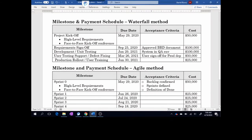In the Waterfall section, we're going to have a project kickoff phase where high-level requirements will be discussed. We're also going to have a face-to-face kickoff conference. Resources from Tech Company Inc. will be traveling overseas to PMO Tools Inc. to attend the conference. In your budget plan you'll need funds allocated for that travel. At that conference overseas, you'll go over high-level requirements and confirm how the project will work. As you can see here, the due date is May 29th at a cost of $50,000.